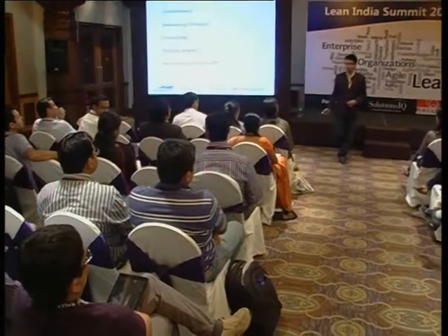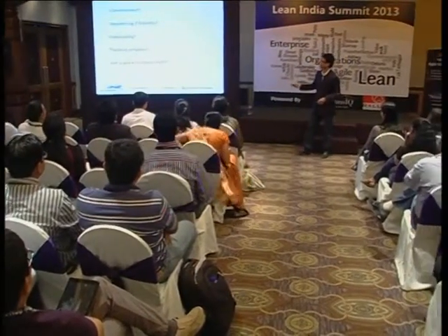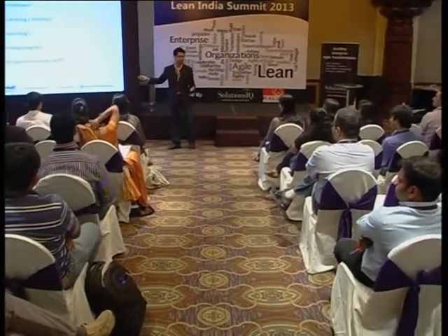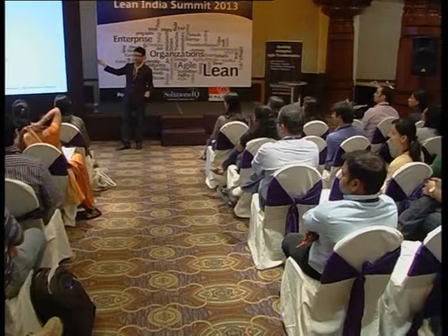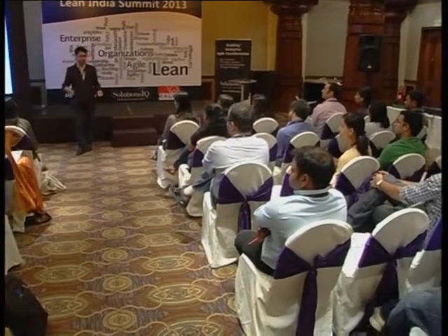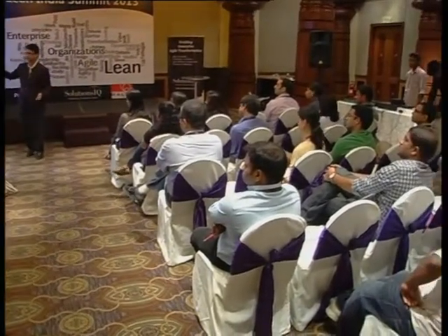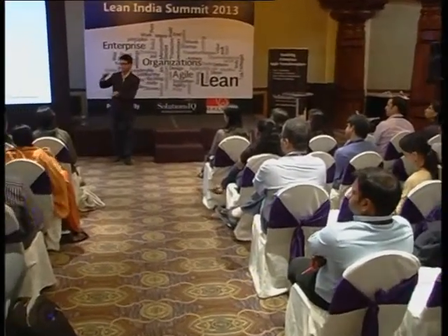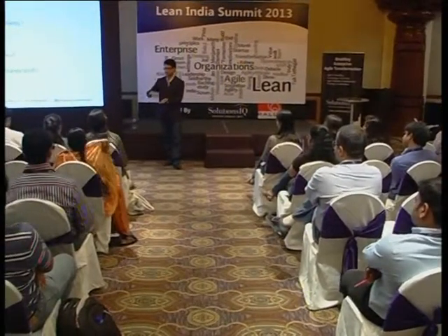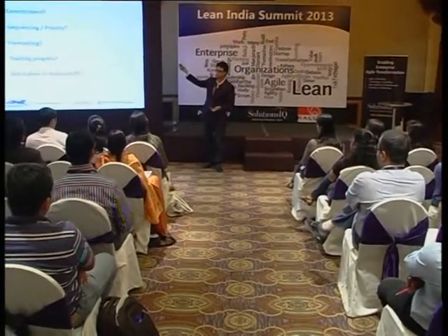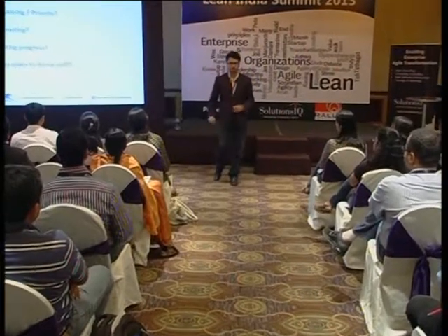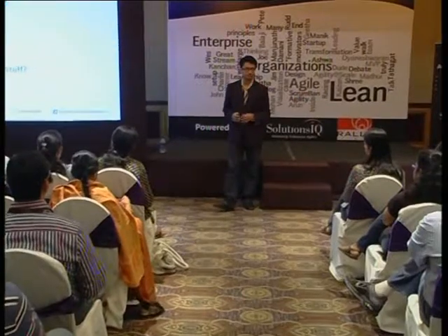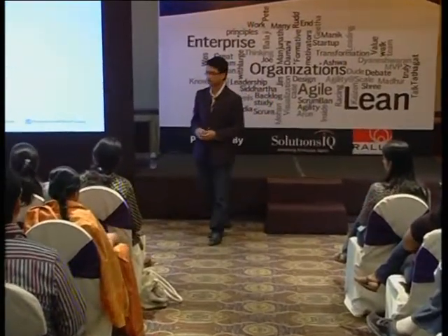Okay. So I just picked up a few things. One was tracking progress to see how much is done, how much is left. One is figuring out the priority so that we know what's next. Another thing is some people use it for commitment. So when it's in the backlog, that means the team has committed to do those things. Right? But does anyone here use a backlog like that? No? Yeah, the sprint backlog, use it like a commitment, but not necessarily the product backlog.